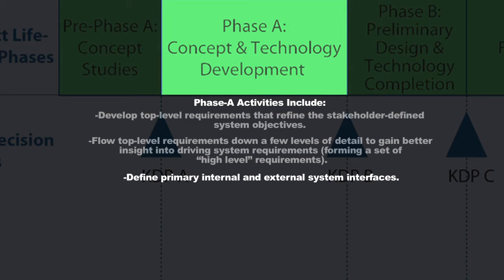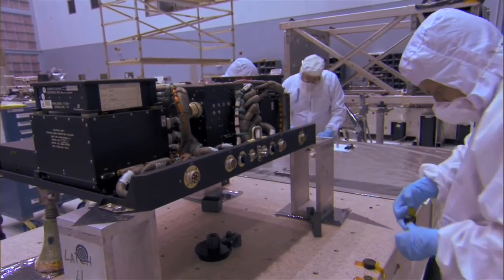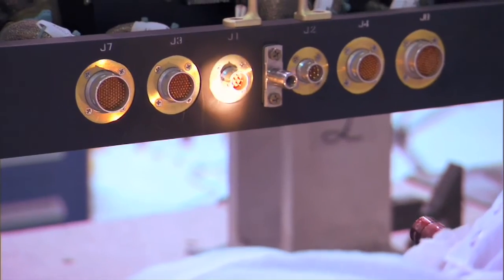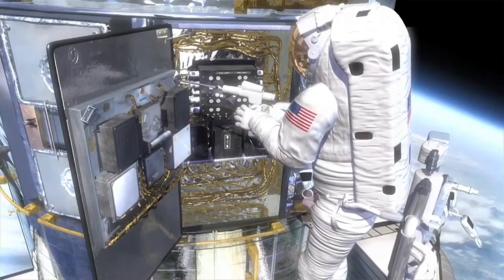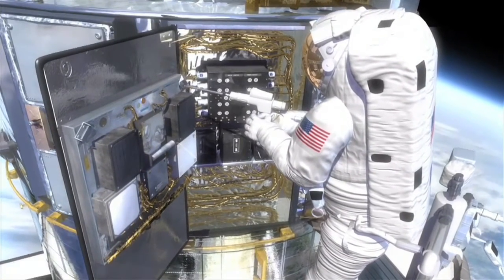You're also going to define all your primary internal and external system interfaces. As you decompose any problem into smaller and smaller pieces, there become many more pieces, and they all have to interface with each other. Within the satellite itself, the power system needs to connect to the propulsion system or the computer system. You need to define those interfaces because many teams will be working on individual parts of the spacecraft and need to understand exactly what the interface will be between them and all other parts, so that when everything comes together it can work properly.